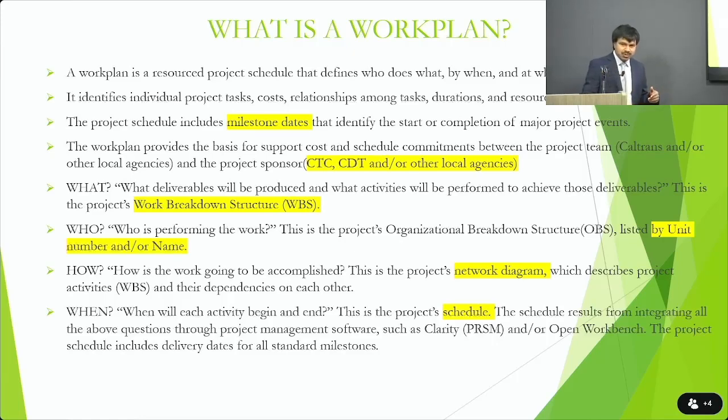And when. So once you develop this work plan during the PID phase, how often you revise it? Before you open a new phase. For example, you open phase 0, you make sure that your schedule is good, your budget is good, so that you're able to deliver the project within the time, within the money that was allocated. So after completion of phase 0, you would revise it on phase 1 again. Every time, at the least, anytime there is a change, and before you open the phase, you would like to revisit the schedule and budget needs for the project.